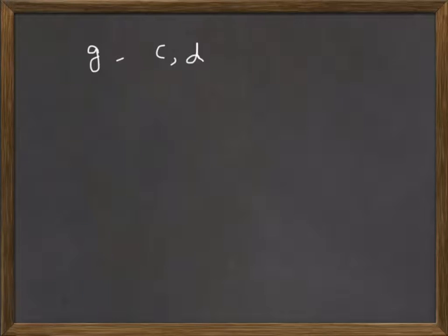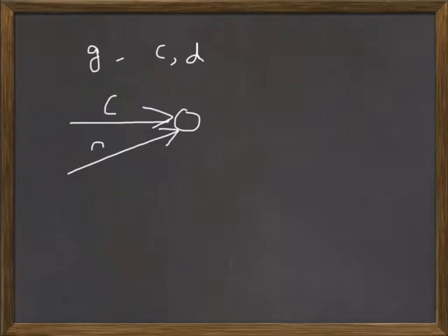Let's say this situation, that for activity G, C and D are immediate predecessors. So suppose you are drawing like this, say C ending here, and D also ending here, and you draw G from here. This is perfectly alright because here you are taking care that G starts from a node where C and D both are ending. But suppose you are not able to visualize this and you have drawn the diagram something like this,